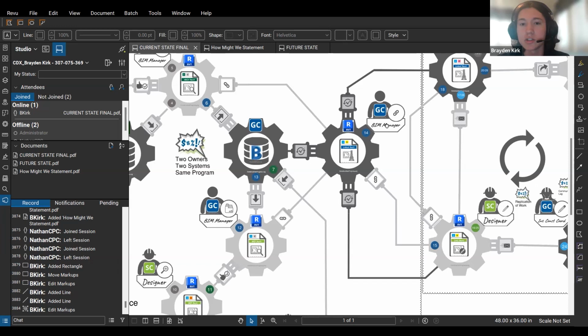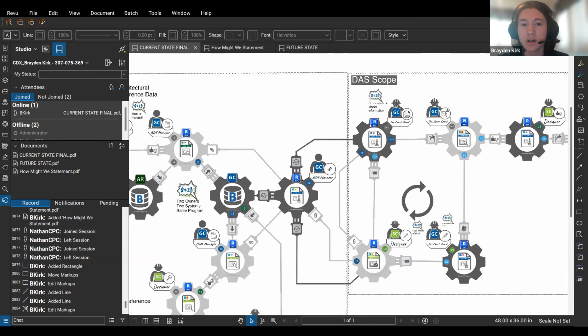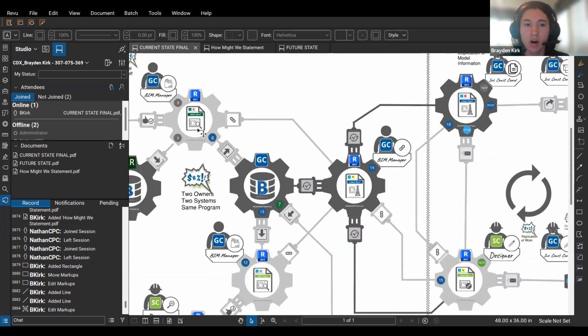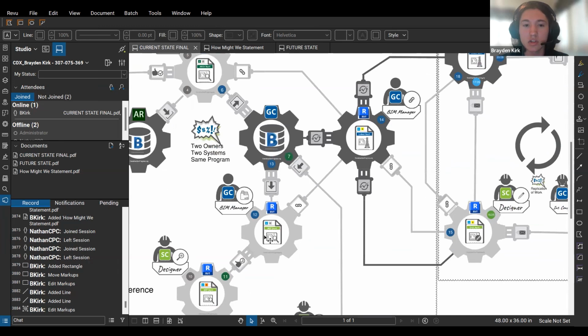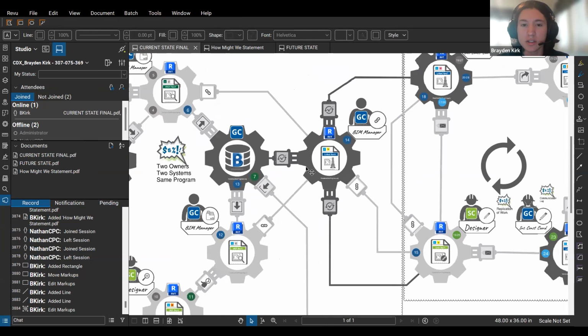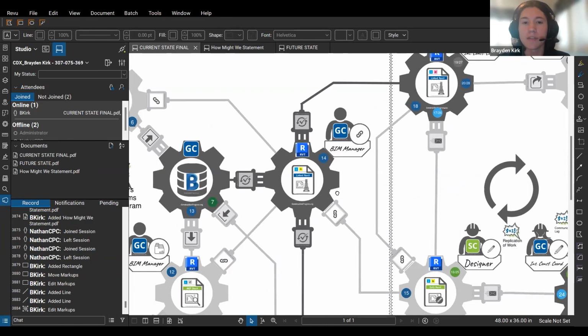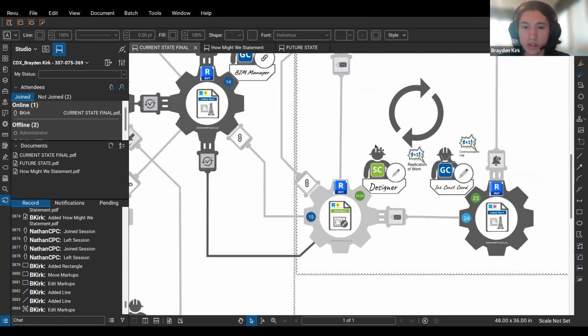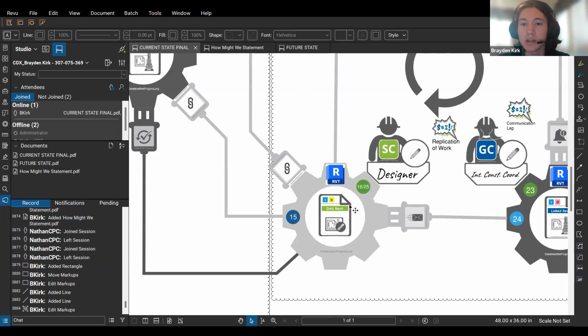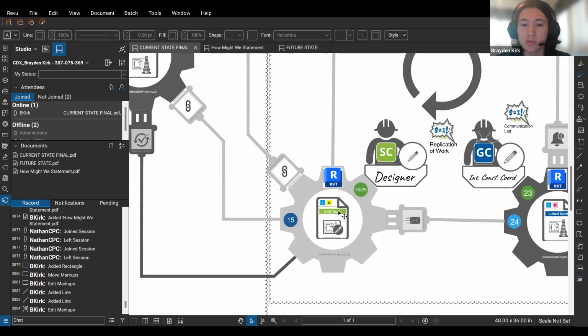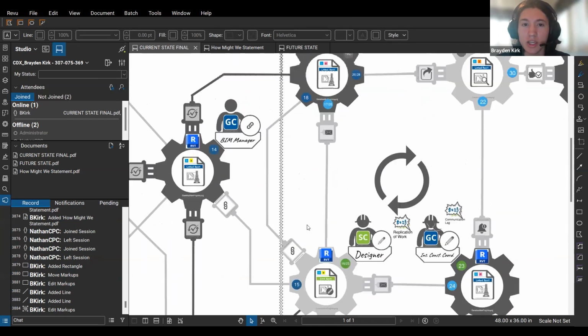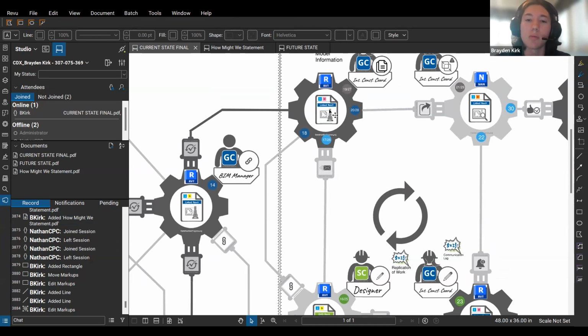But the BIM manager, as we move into the coordination of the DAS itself, at some point would create a linked Revit model, which links all the architectural Revit information and the existing trade information, the MEP, all of that into this central file. The designer from Henderson for the DAS scope would then utilize that information to model in the radio boxes, antennas, and cable networks that are included in the DAS scope, which feed the signal for phones and such throughout the stadium. They would add that into a linked Revit file, or separate file that they created, that they would then link into the master linked Revit that Mortensen had.